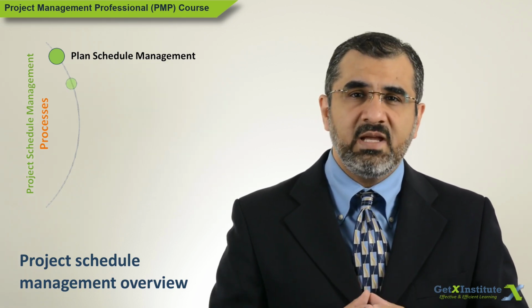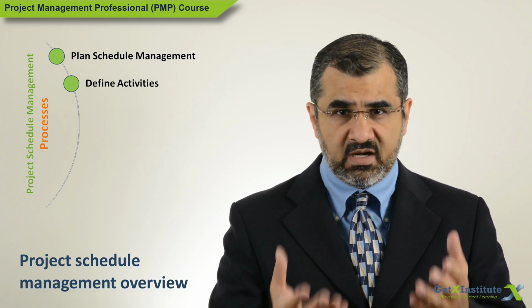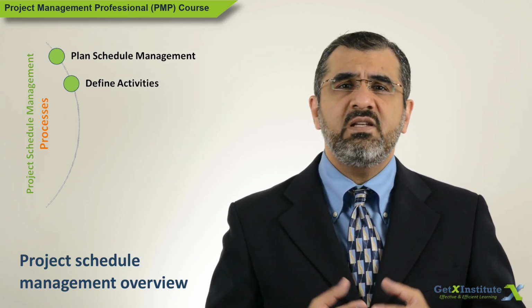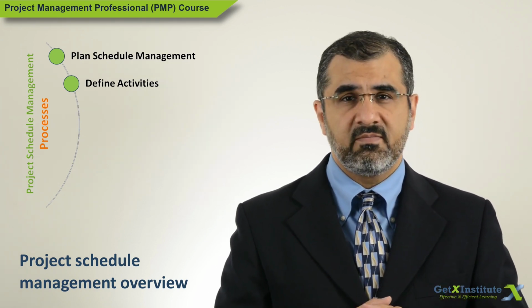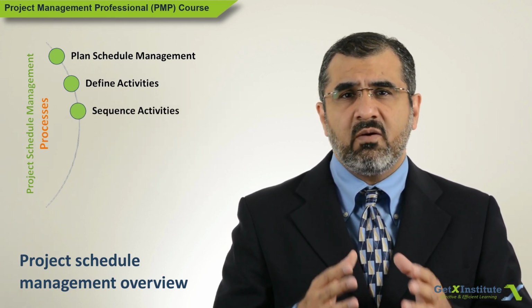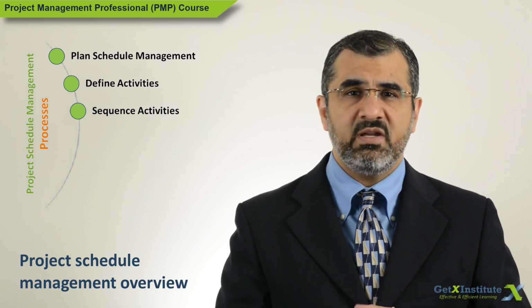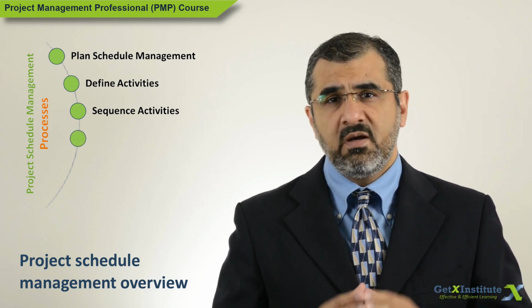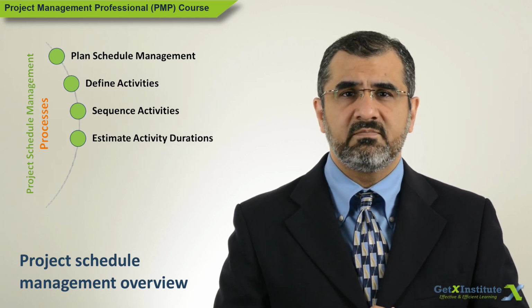With the plan in place, the project will take the work breakdown structure as the starting point and create a list of all the work to be done in the form of activities. Then, based on what will be done first and what will be worked on later, a network diagram will be created. Next, durations will be estimated for all the activities on the network diagram.